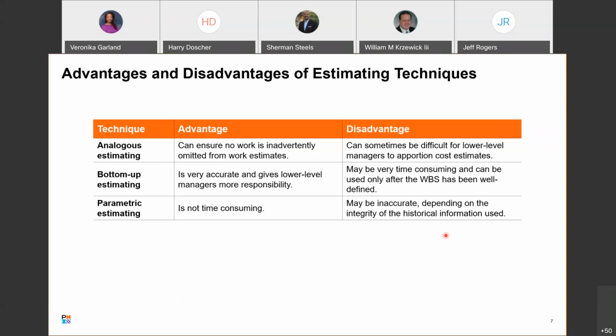So if you've got a really rich set of estimates from before, from previous projects, you're better off than most people because, unfortunately, usually not everything's captured. So in order for this to be accurate, you need to have good historic data.